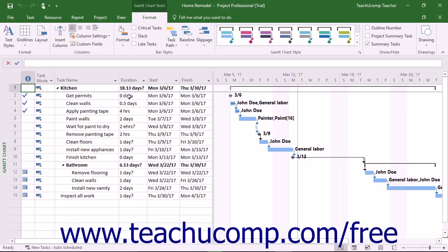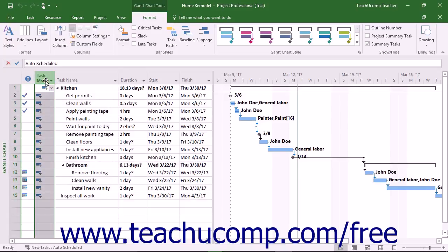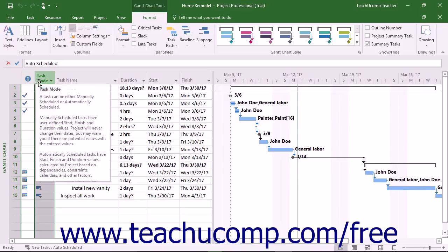You can insert many different columns into the Gantt Chart view to display whatever task-related project data you want. To insert a column into the column list, select the column to the right of the place where you want to insert a new column. New columns will be inserted to the left of the selected column.